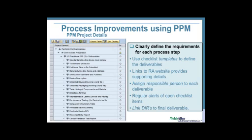You can see some of them are called standards listing for device must comply, trade name of the device, end item submission to be end item SKUs to be submitted, etc. Behind each one of these checklist items is one or more documents that must be created, released, approved, and associated with the checklist item before this item can be completed. This then defines all of the requirements as we understand it for a submission to a certain country in the deliverable preparation phase, and that becomes our best practices for submission.